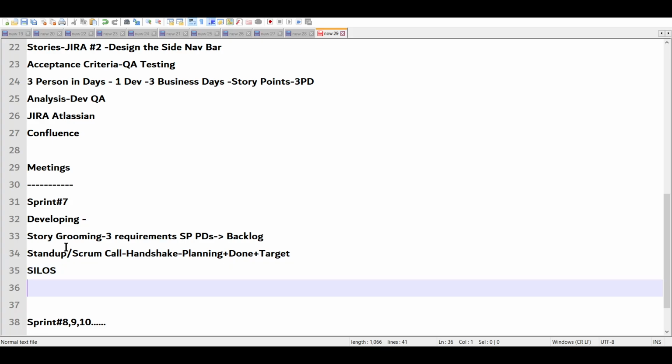And then there is a retrospective session, retrospectives at the end of the Scrum. So here all the people come back and it's a joyful session. That's what I would call it. People say what their learnings are, maybe what they want to say as feedback. The Scrum Masters might share the velocity of the sprint, how fast it is progressing, how many spillovers are there, meaning how many they planned but they could not deliver, but it has to go onto the next sprint. So spillovers might be there.